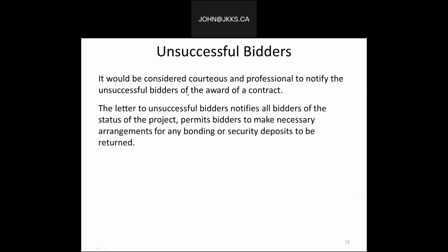Unsuccessful bidders. Simply, it would be a nice courtesy and a professional obligation to notify the unsuccessful bidders of the award of a contract. The letter to unsuccessful bidders notifies all bidders of the status of the project and permits bidders to make necessary arrangements for any bonding or security deposits to be returned. Again, just a nice formal way of advising the bidders and perhaps keeping them in good nature for any future upcoming projects.